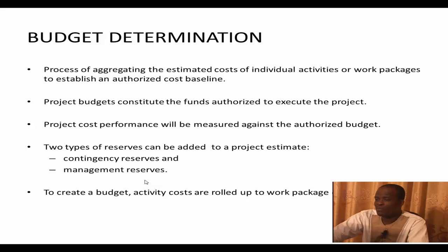As I said, budget determination is summing up all the cost estimates of the individual activities or work packages that you looked at in the cost estimation process to establish a cost baseline. And this budget constitutes the funds authorized to execute the project. Okay. Usually, and almost always, the performance of the project in terms of costs will be measured against whatever budget has been authorized.